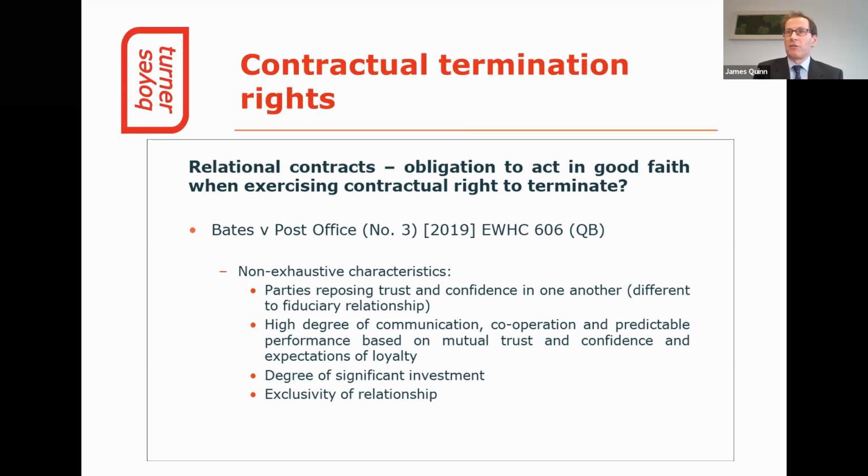There may be a degree of significant investment by one or both parties. The judge said that this might be more accurately described as substantial financial commitment. Lastly, exclusivity of relationship might be present, and the judge found that all these features were present in the relationship between the post office and the postmasters. He emphasised that accepting that these contracts were relational did not mean that there would be an automatic and widespread application of an implied duty of good faith to all commercial relationships. Very specific characteristics are needed to categorise a commercial contract as a relational one.